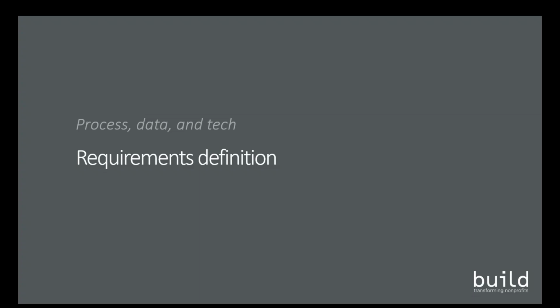A technological requirement related to that would be the ability to have full data encryption, both when it's moving over the internet and at rest in the database, for all counselor, client, and case data. So you are generally dividing things into business requirements and technical requirements. That's the most common experience of technology solution vendors, and you have the key data collection points and reporting requirements baked into the business requirements.